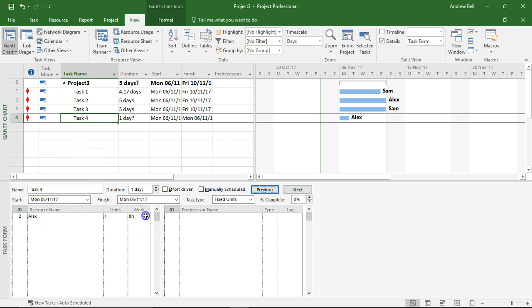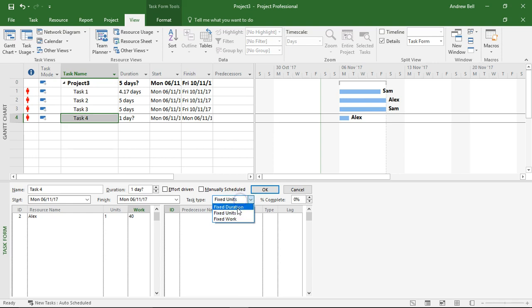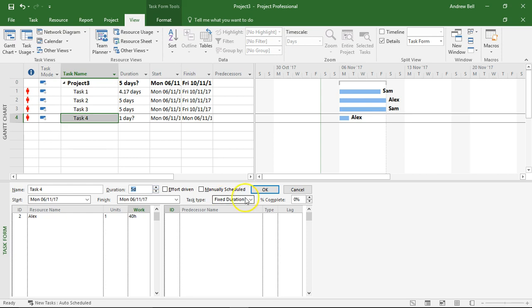And then task four which Alex is doing I'm going to make this 40 hours of work. Click OK. I'm going to make it fixed duration and I'm going to make it five days. Fixed duration.